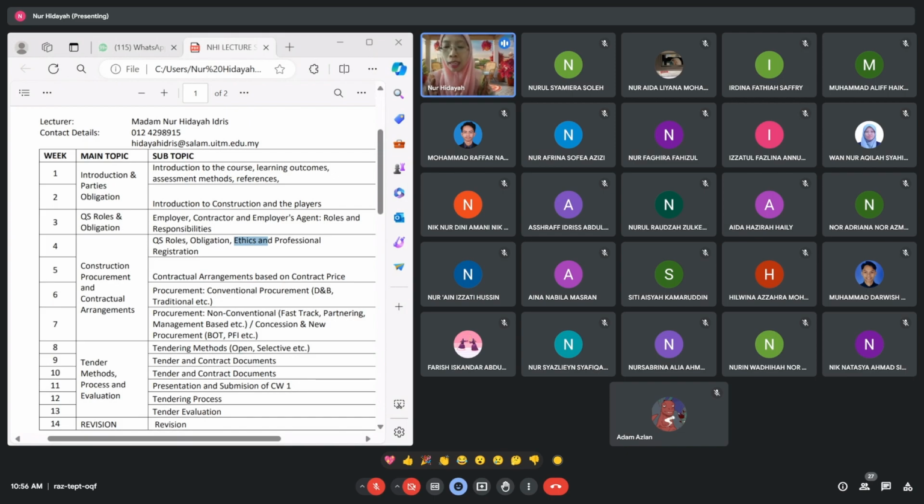Please answer. Why is it? You have seen what I explained earlier. For elemental, every element in the building works, we break down by element, and all the works under that element, we put under that particular element, precisely and specifically. If trade BQ, regardless of which element you are in, as long as you are involved with that particular trade, you have to lump them together.